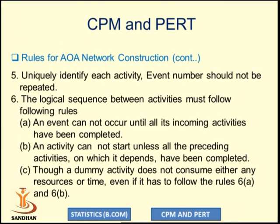Each activity must be uniquely identified and event numbers should not be repeated. The logical sequence between activities must follow these rules: an activity cannot occur until all its incoming activities have been completed, and an activity cannot start unless all preceding activities on which it depends have been completed. Even a dummy activity, which consumes no resource or time, must follow these precedence rules. This rule number six for precedence relationship is the most important in drawing an AOA network diagram.